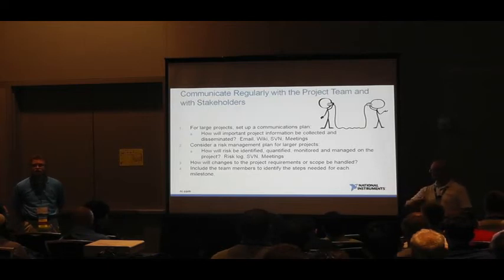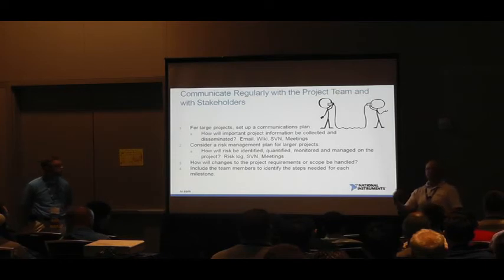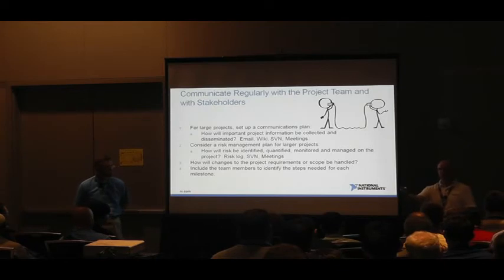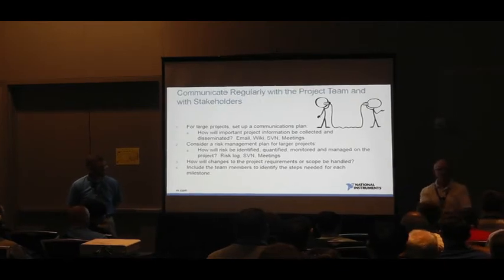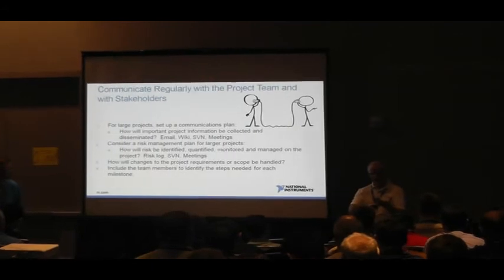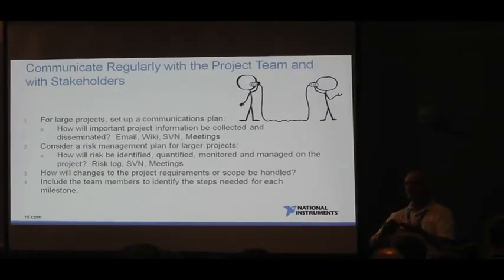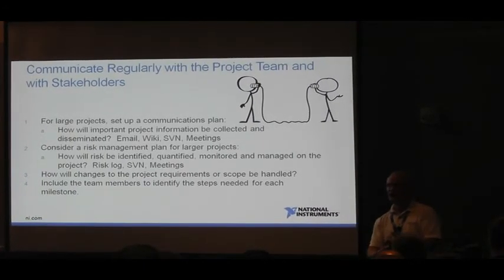Project management experts recommend that you have at least weekly communications where you're communicating with your team and with stakeholders about progress on the project, how you're doing with completing tasks, and how you're going with your burn rate on your engineering hours and your materials spend. Sometimes at the beginning of a project you're front-loaded, and you've got this chart that's going off, you're going to be way overspent, but sometimes that's appropriate, and you note that.